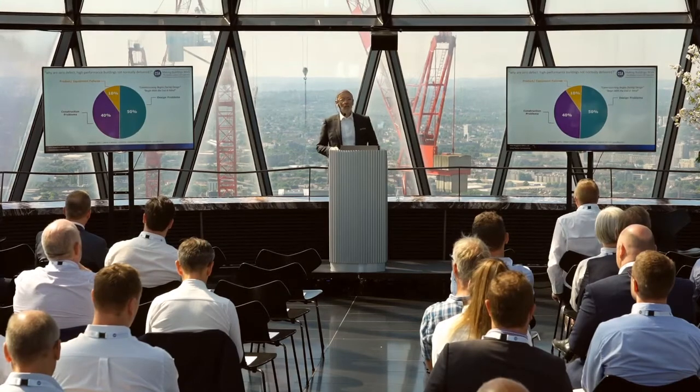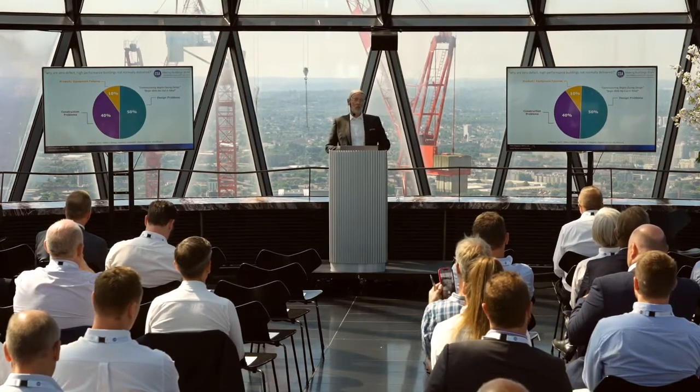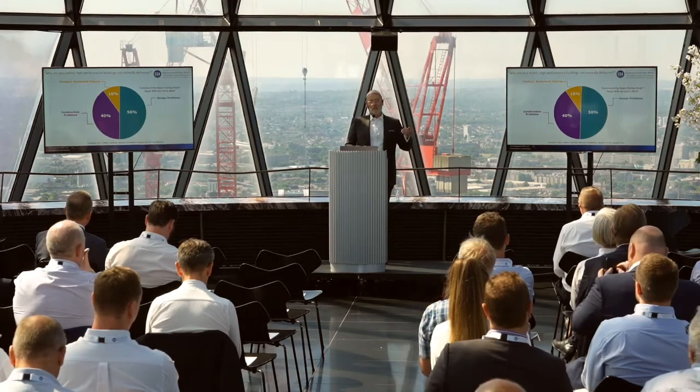This is a research project by BRE. They found, canvassing projects all across the UK, that 50% of every problem is a design problem. I would argue it's more than that. That's where my 80% comes from. But let's pretend I'm not making it up. So BRE, no less, declare 50% of all problems you face are design-based problems.